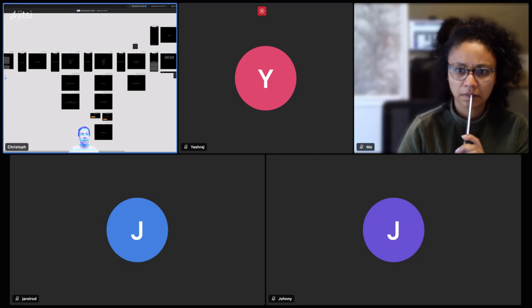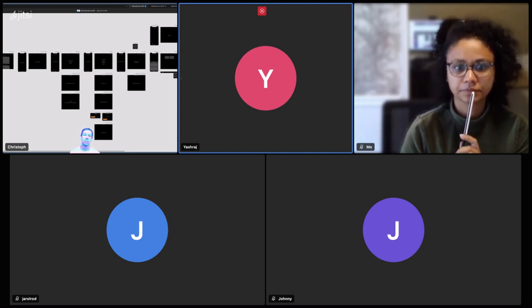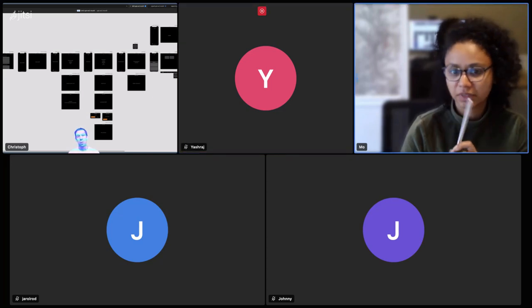Ideally, at the end of this exercise, we have 2 prototypes that allow us to click through all the different screens, basically. And another way we could approach this is that for this item we open up 2 issues. One of them has the design label, and that's where we have all this conversation, and then we have a regular issue, and that is about the code and building that design, and we can link them. Yeah, I like that idea very much. 2 issues, one for the design and one for the development.